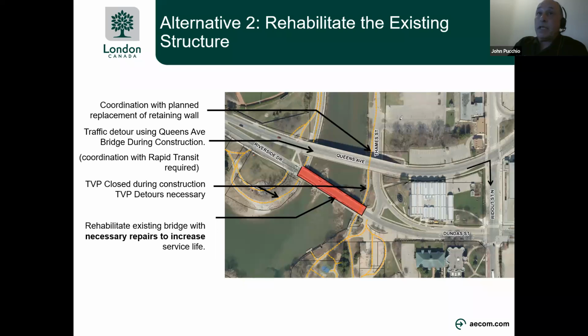Alternative 2 represents a major and significant undertaking to rehabilitate the bridge and upgrade various structural elements of the bridge to the current bridge code. The full scope of rehabilitation work would need to address noted issues at the bridge over the remaining service life, which could include, but not limited to, the following. There's ongoing deterioration of the deck slab, as mentioned earlier. This results in periodic repairs, and this needs to be addressed potentially through deck replacement.